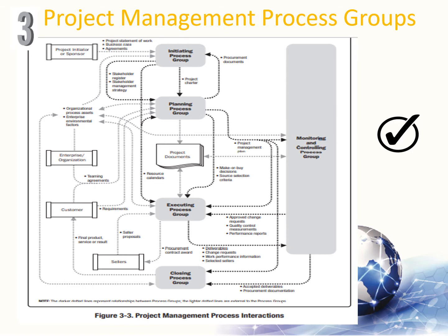The project management processes are shown in the process group in which most of the related activities take place. So for example, a process that normally takes place in the planning phase is put into the planning process group. When this process is updated by the executing process group, process or activity, it is not considered a new process within the executing process group, but is still a planning process group process or activity. The iterative nature of project management means that processes from any group may be reused throughout the project life cycle. So for example, in response to a risk event, executing a risk response may trigger further analysis, which leads to another iteration of the identify risk process and the associated perform quantitative risk analysis processes to evaluate the impact.